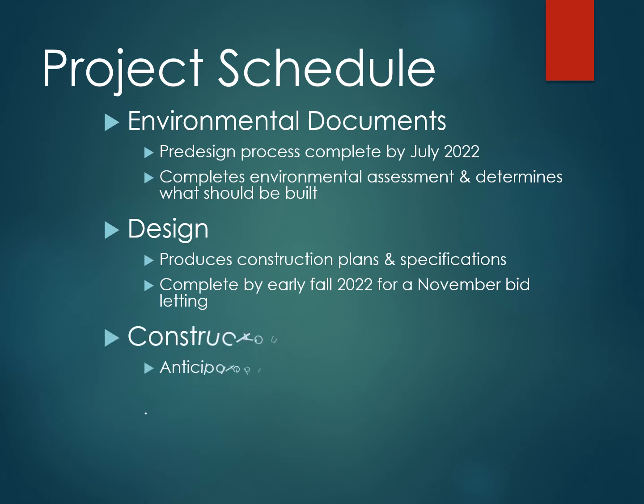The project schedule for this project involves several different items. The first is the environmental document, which needs to be completed, which includes wetland delineations and archaeological or cultural resources surveys. This pre-design process has been completed, and the document will be completed for this project by July of 2022.